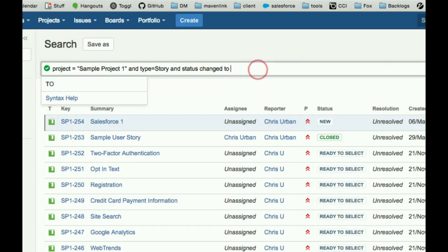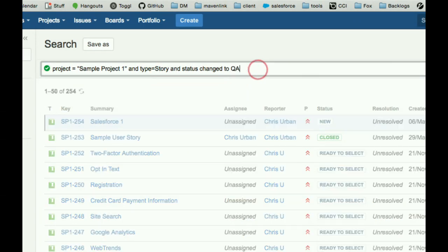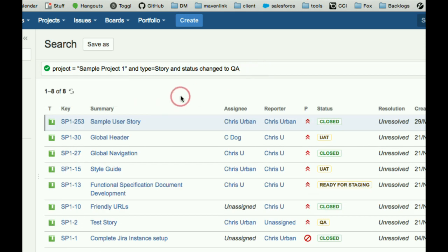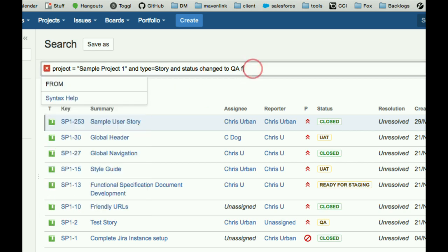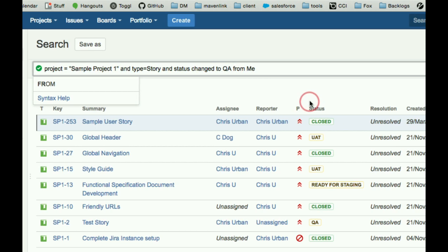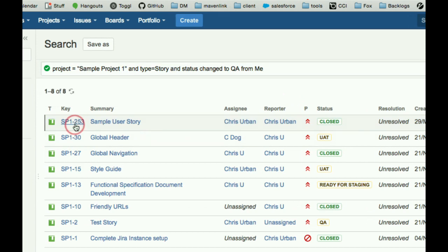So if I do changed to QA, it will give me all the tickets that went into QA, but I don't say from where. So if I say to QA from, and then what are the states that I could do it from? From UAT or from merge ready or whatever the previous state is, that will give you that specific transition. So all you have to do is go back to your workflow, take those two states, put them in here, and so in this case, SP1250,